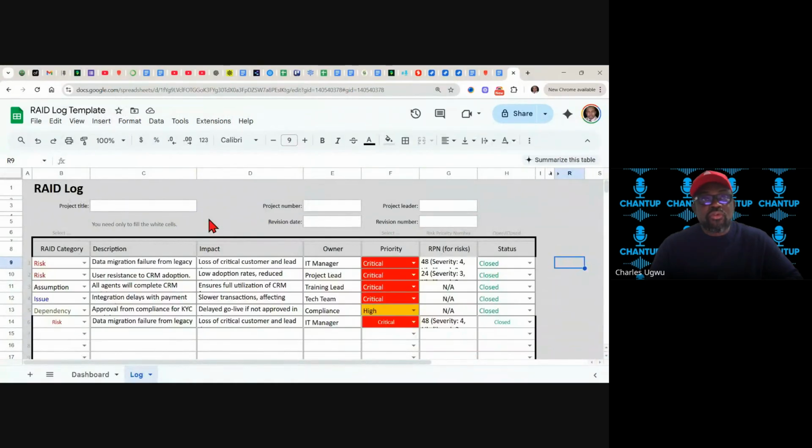You try overtime, you even try to work on Saturdays and Sundays, but you find out there is still a lot of activity that needs to be done. You try everything, and you find out it's not happening. Within the 2 weeks, you have already spotted it. That is now a risk. Looking at everything, it is glaring that you might not be able to finish. You can then capture it as a risk.